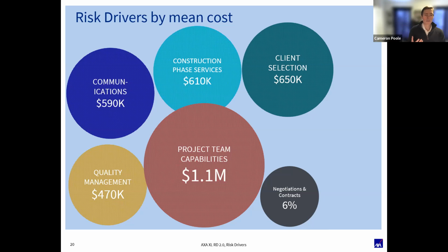And so the important thing there to consider is the more you can work with the same subconsultants again and again, the better, because you develop that relationship of trust with them. They trust you. The communication is there as well. You have to think that as the architect, your contract is directly with the client. If you have your subconsultants under you, you are responsible for the acts and omissions of your subs. And so if there's an issue, even if it's very clearly a structural engineering issue, the client has to go through you to get to the structural. So they'll be suing you to get to the structural. So that's the importance of having the right folks on the project.